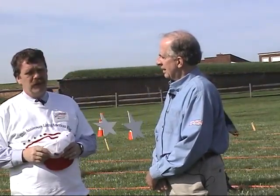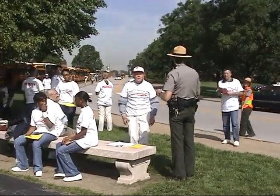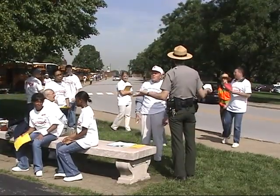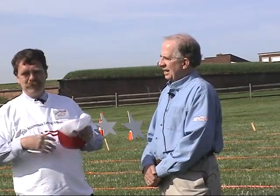We've got the National Guard coming in to provide drinking water for the event. Fort staff helps by making sure that the grounds are mowed in advance. One interesting issue is you want to mow the grass far enough in advance that those children that have allergies aren't affected by all the dust that you've stirred up. So you really want the grass mowed 5 days before the event.